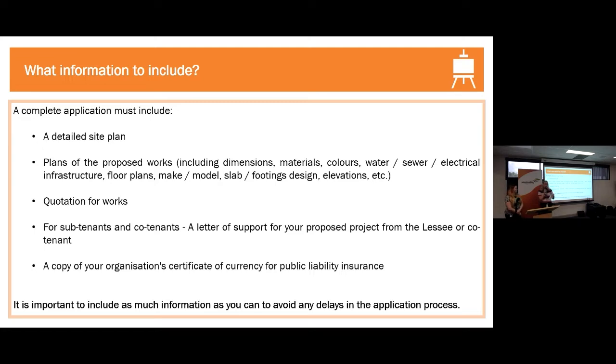They'll require an aerial map of the site and an indication of where that shed's going to be located. This is required in case of any future planning requirements that council may have, and as Michael and Jamie spoke about, it could be planning schemes and flood planning as well.